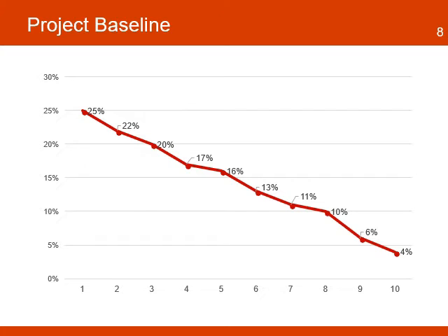As the data is collected and analyzed, the monitoring system will show how the indicator starts to change until the end of the project. Any deviations from the planned progress will require a deeper analysis and a solution to help put the project back on track. In this chart, the baseline value was at 25%. As the project made progress, it used this value to compare the changes of the indicator.